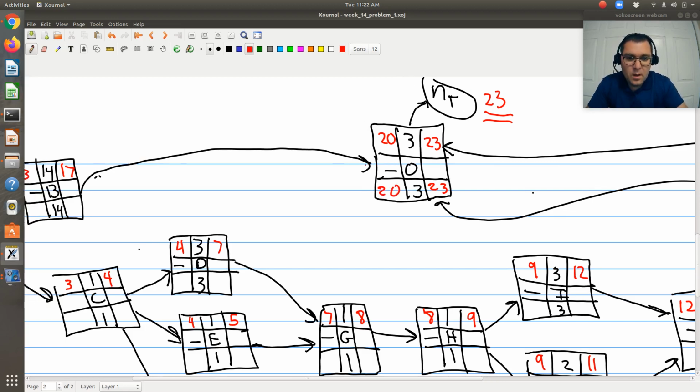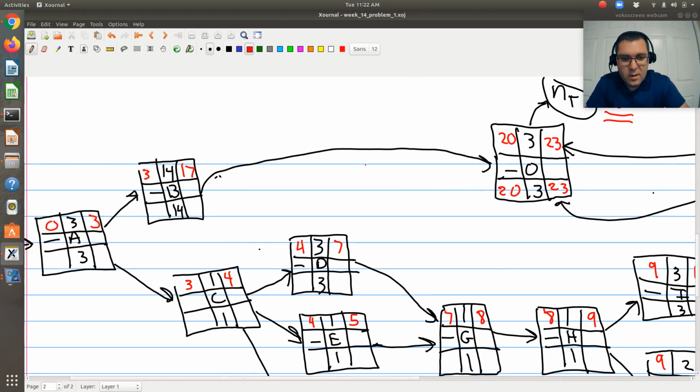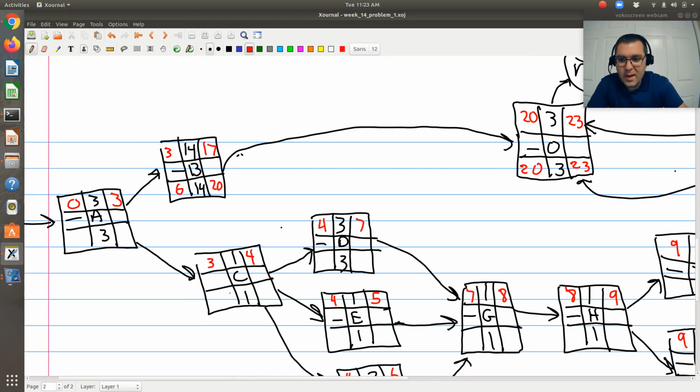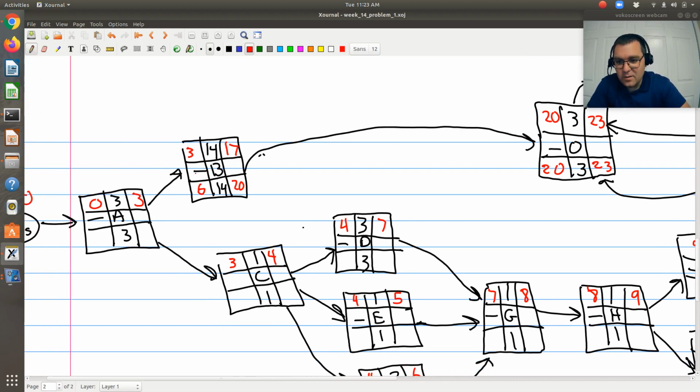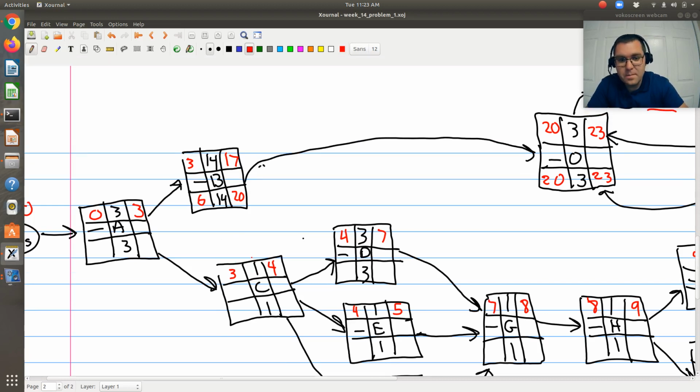Now let's work backwards. Going from O, I'm going to need to go to B, then M and N. Before O can begin, B needs to complete. So if O needs to begin by day 20, B needs to be completed by day 20. It has a duration of 14, so it needs to begin by day 6. From B, I can't go to A because A has a precedence of both B and C, so I'm going to need to know the latest possible starting and finishing times for C.